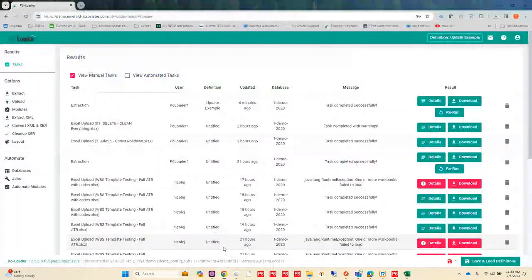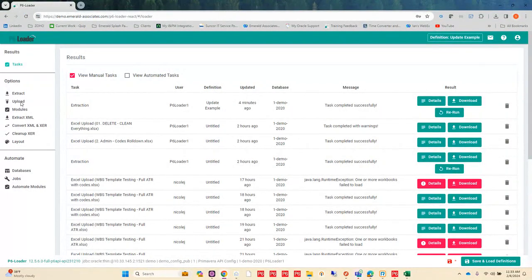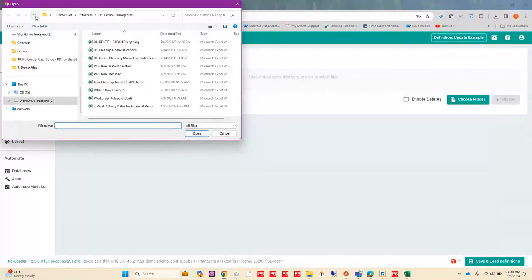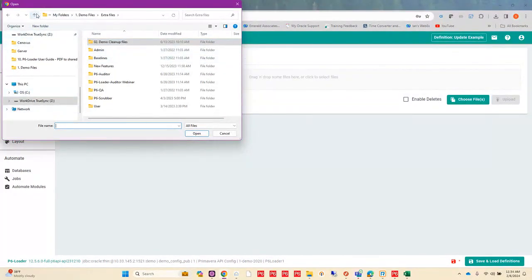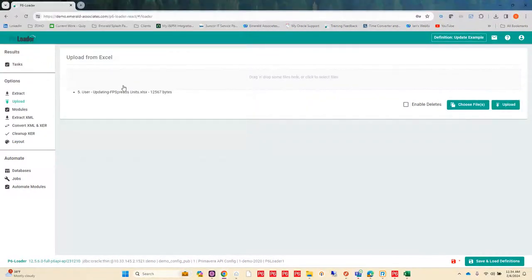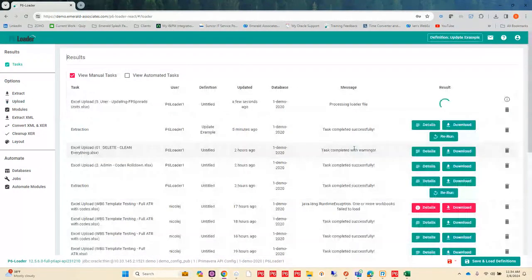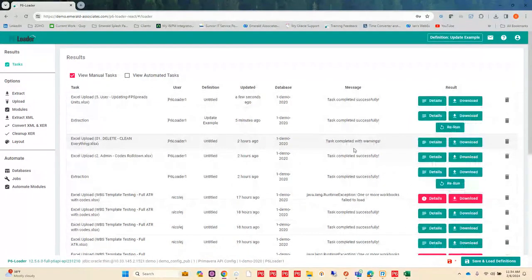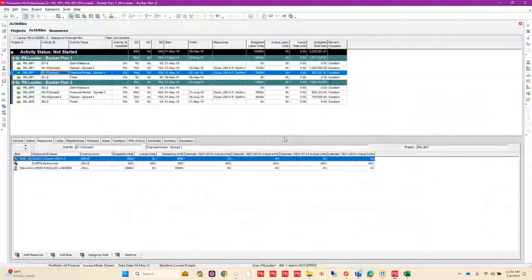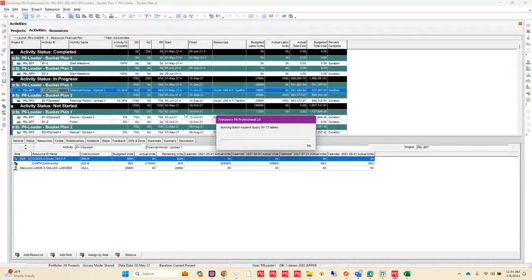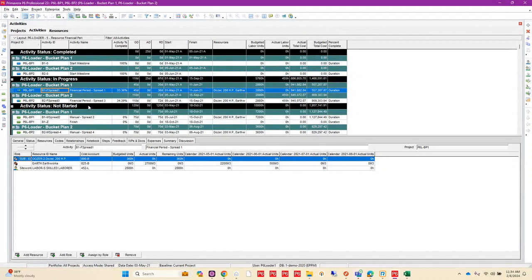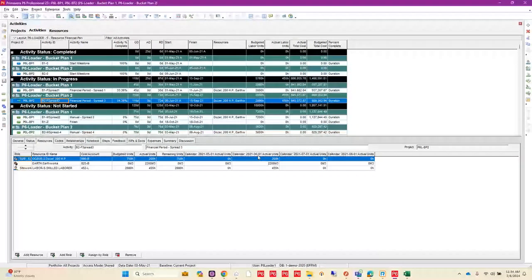I've saved that spreadsheet and I'm going to upload it. I select the file and tell P6 Loader to upload the data. P6 Loader goes out, works on it, and when completed tells me it was successful. I go into P6 and refresh my data — since this hits the database directly, I need to bring those updates back in. I can then see the progress entered with that load, and I have my period buckets populated as well as the resource assignments.